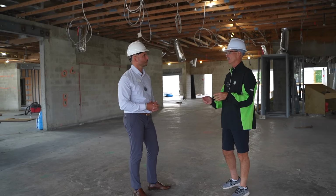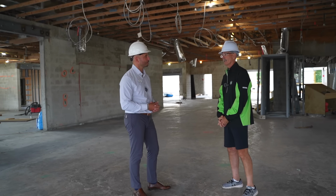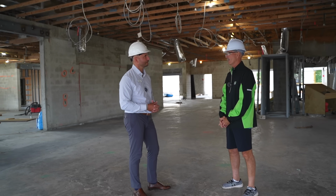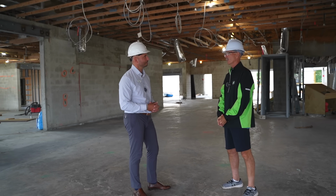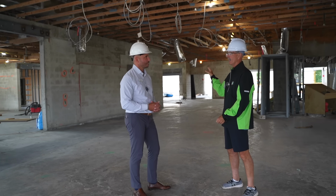So it breaks up very easy, and it's the same rock we see around the club, at the edges of our water features. That's right. So it's being trucked away, probably being resold, but we'll pay a small change order, I think, for some of that time, and we're tracking that. Yeah. But that's a massive operation at that end.